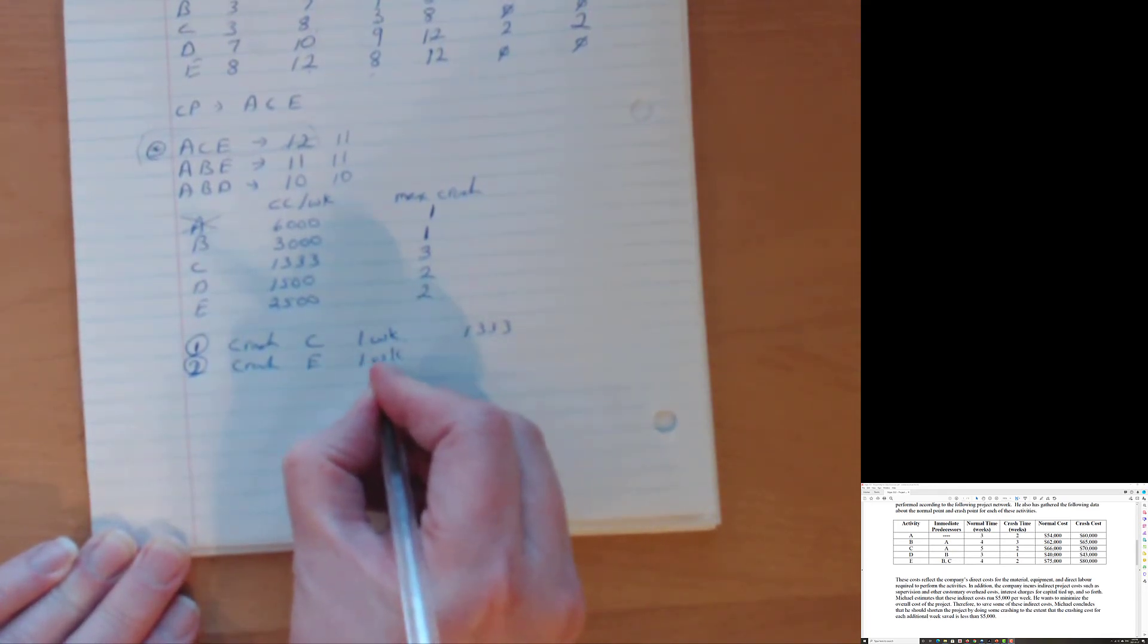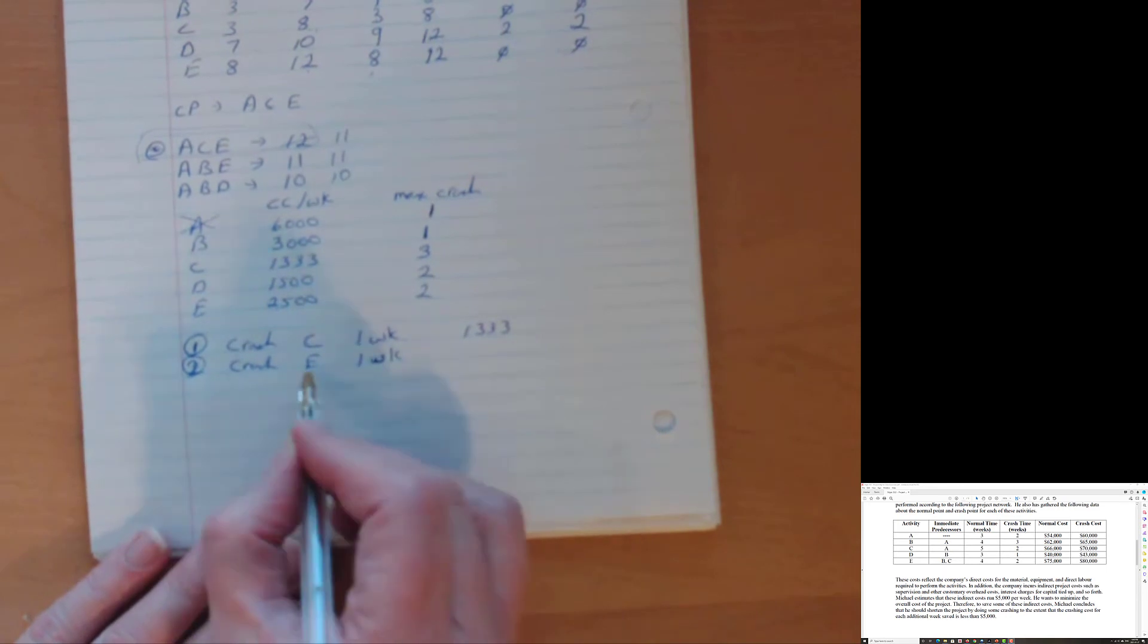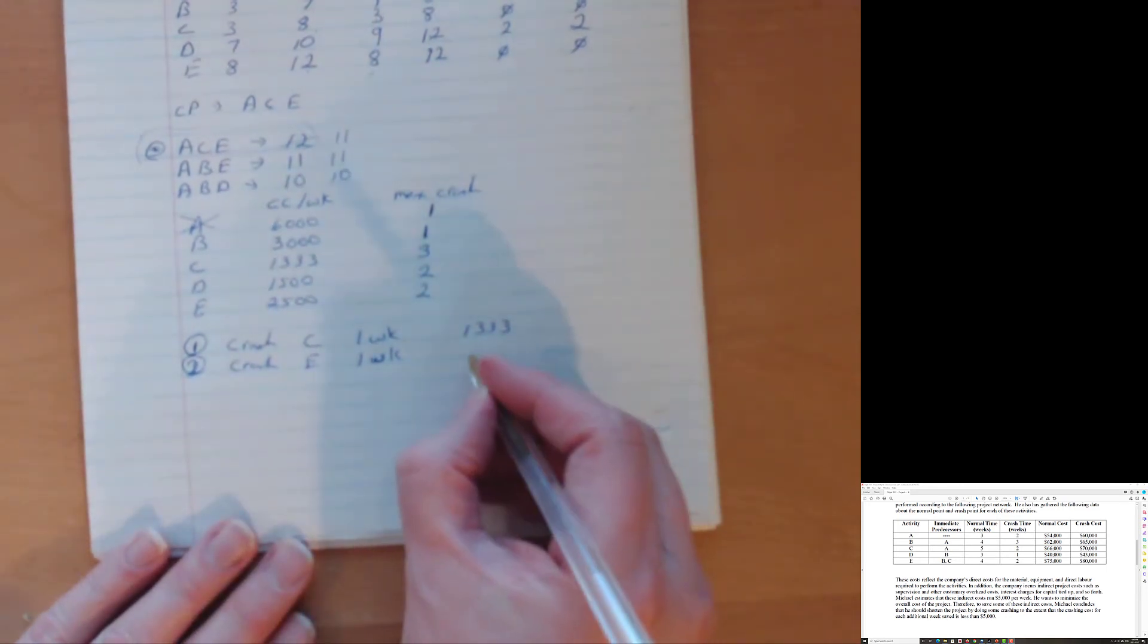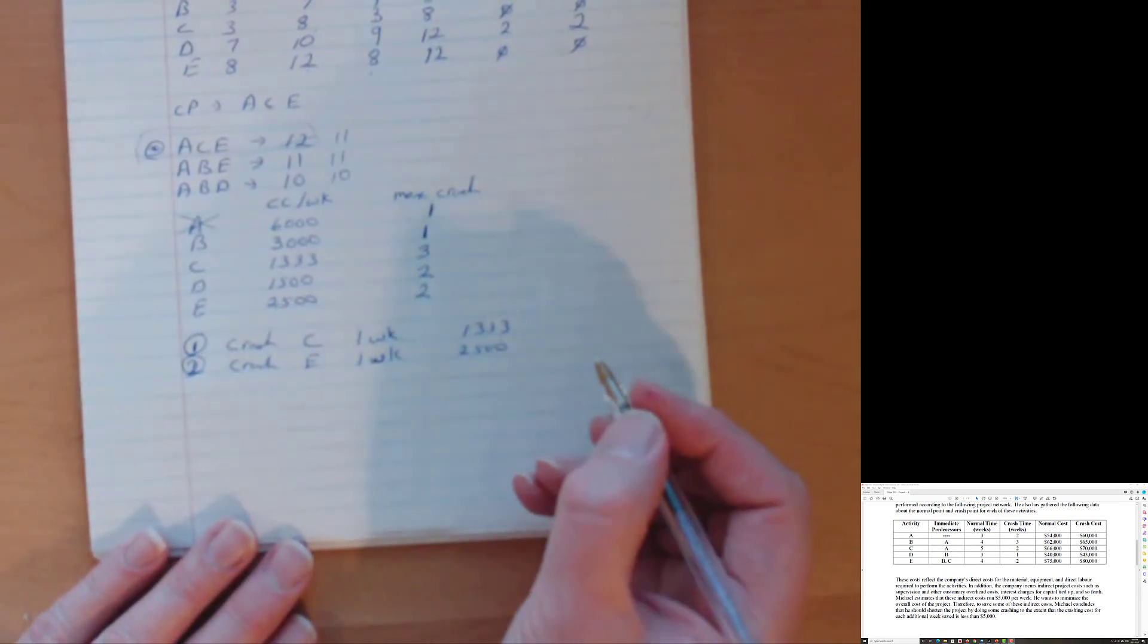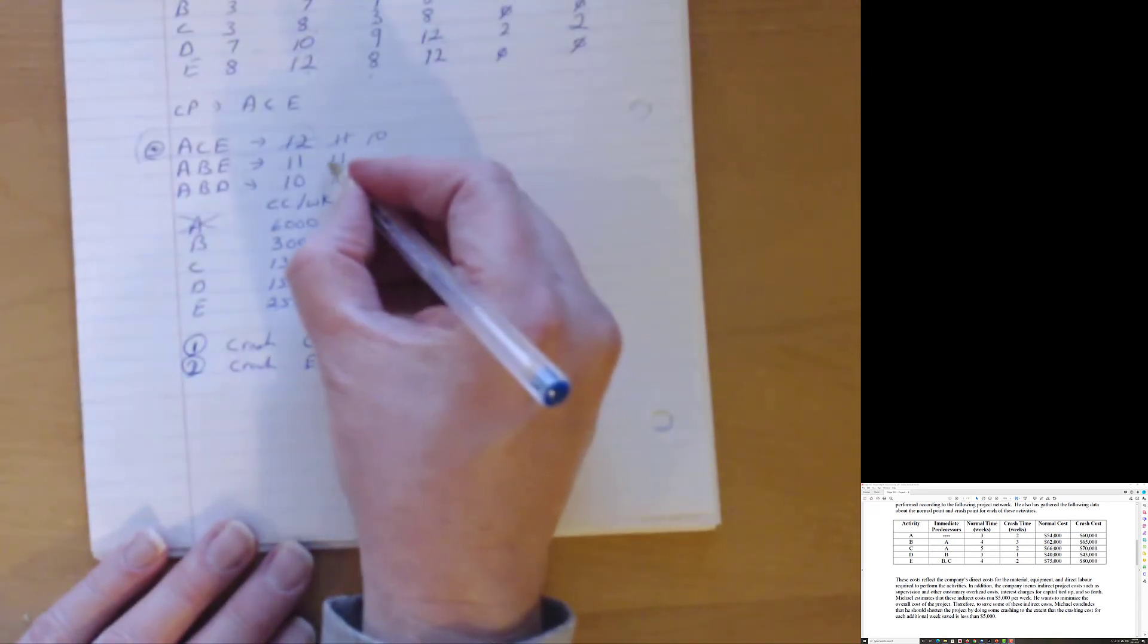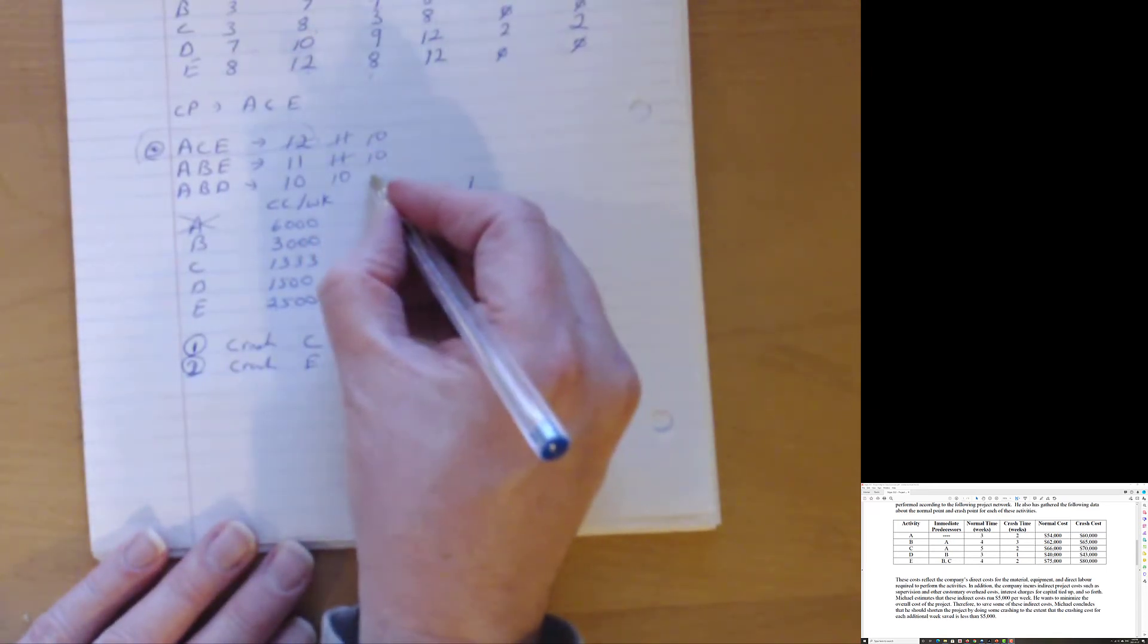Now you'll notice that we're doing this one period by one period. And that's because, yeah, great crash C by two weeks, but then it's not the critical path anymore. And something else is the critical path. And that crashing C wouldn't have done us any good here. So we're gonna crash E one week. That's going to cost us $2,500. What's going to be the impact of that? Well, it's going to take our critical path, that one down to 10, that one down to 10. And this one stays at 10.